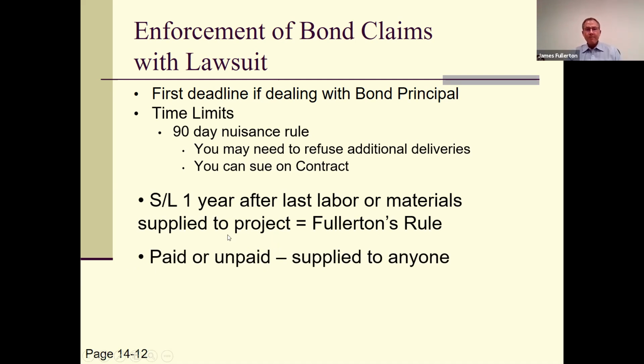The wording on the statute's also different here. You'll remember that I said that you had to send your notice within 90 days of the last supply for which such claim is made. And in other words, paid deliveries did not extend your time to send the bond claim notice. The wording is different